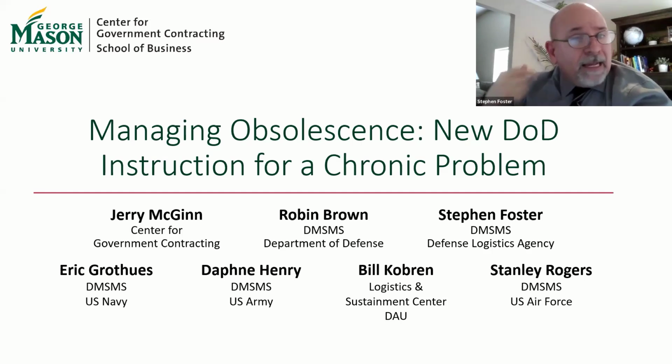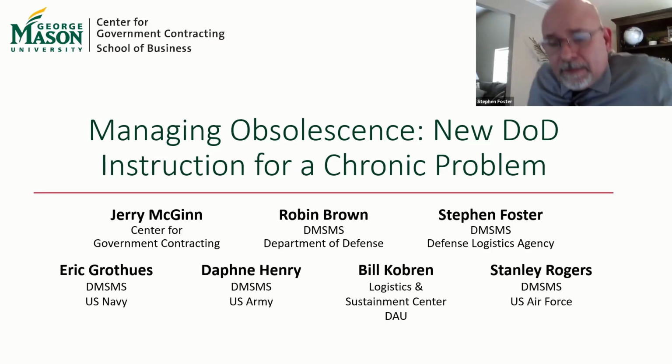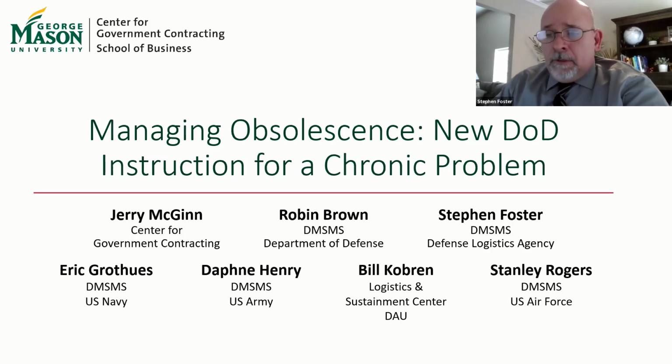So just to go back again to Robin's original question that she answered, I'm in complete concurrence that the earlier that you can plan and budget in the life cycle of the system, the better, because it will help avoid these things. Unless you run into the unexpected matters. Dr. Rogers mentioned what happens when you expand the life of an airframe. We push it out 20 years. Well, now all the associated parts that we had a DMS plan in for, now we've just added 20 years to that. So now we have to reevaluate. We just have to know. The earlier we know, the better.